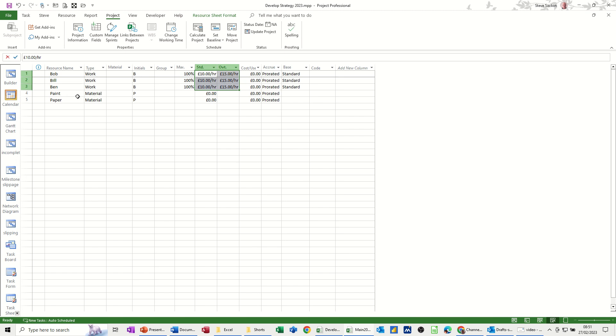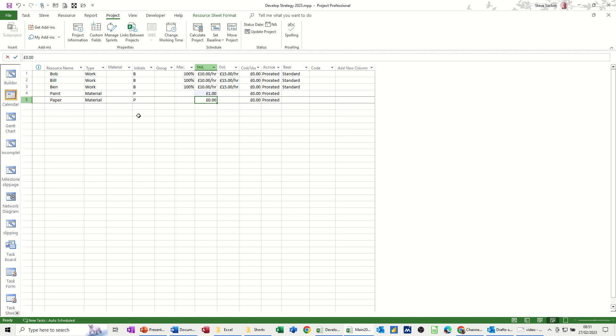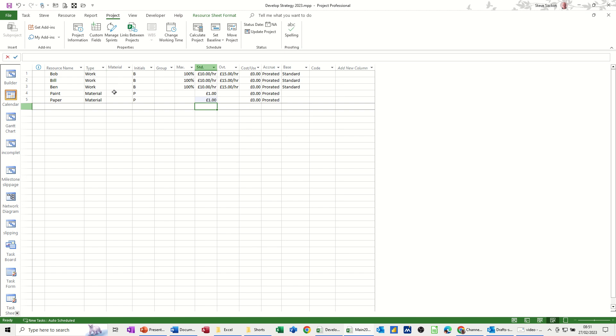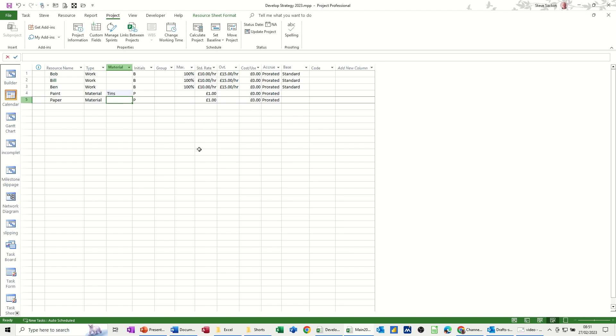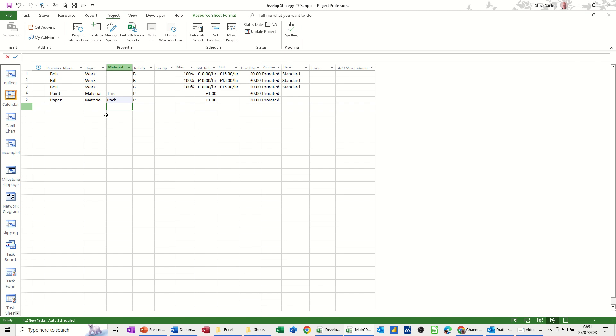So let's say they're on £10 an hour and £15 overtime. Now, every time we use a tin of paint, I'm going to say it's going to cost £1. Likewise, with a pack of paper, that's going to cost £1. Now, what you've got with material, you can have a material label. So I'll put that as tins. And I'll put that as pack. So that's what will appear on the Gantt chart. So that's everything set up.